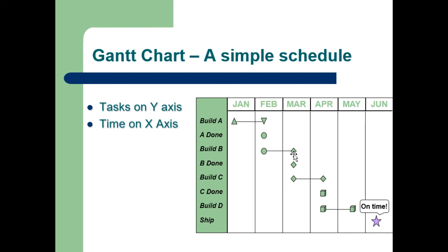So suppose, for instance, task C can start after task A is finished, right? So I would move this diamond right here, right under A, and connect them with a line so that B starts and C starts at the same time, right when A is finishing. And that way the whole project down here shortens up. Instead of doing everything one after the other and only one thing at a time, I can do things in parallel and really shorten up the project.